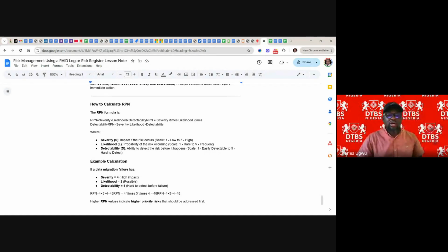Or if you are working alone as a lone ranger, you use your own standard, your judgment, to give it a scale. If you think it is a 5, you give it 5. If you think the severity is 4, you give it 4. But if you are working as a group, everybody makes an input and you get the average.